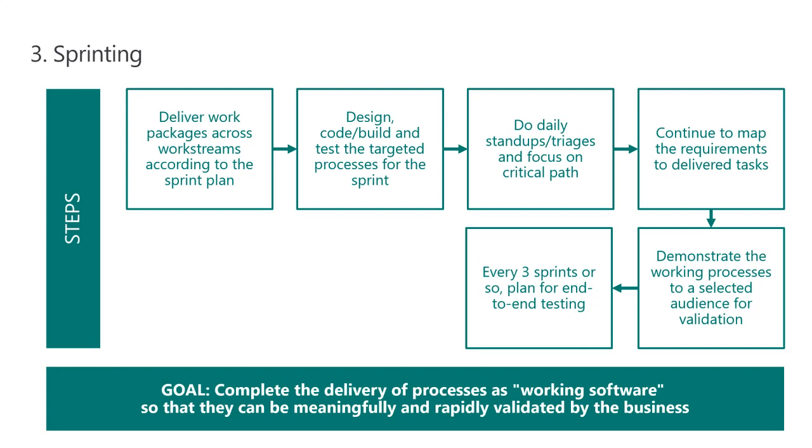You can use some of the standard Agile techniques on a daily stand-up, but do it from a business process perspective. Continue to map all of this work back to requirements, because you do need to map it back to the list of requirements that you might have, so that you know that you're being honest in terms of delivering to the overall scope and the overall requirements delivery.